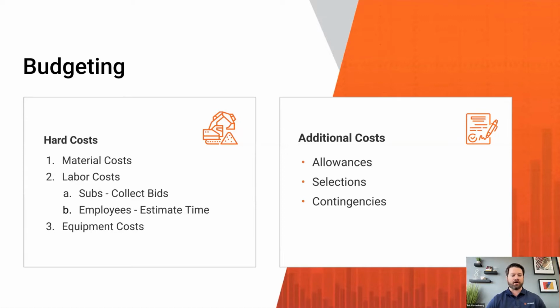Third cost, again, is equipment costs. Some of y'all may own your own equipment. You may be renting equipment. I think the thing that I frequently see is not taking into account that you could have maintenance issues there. You could need to pay the cost to repair the equipment.